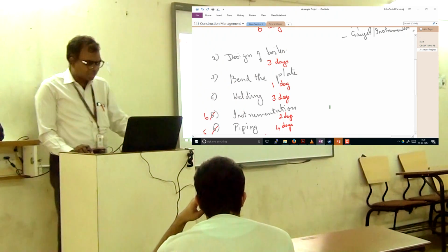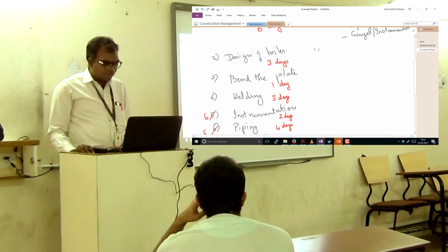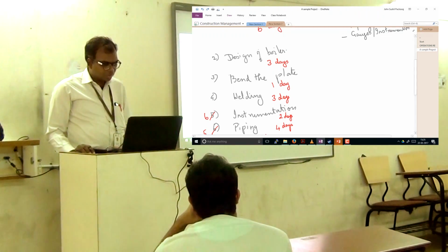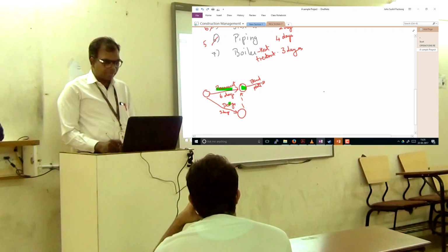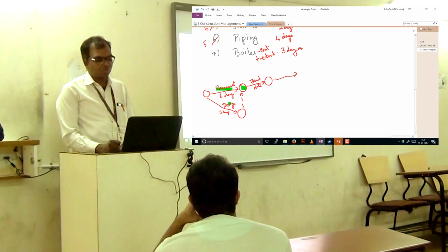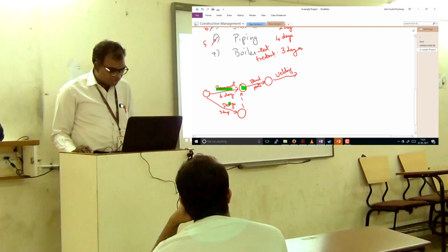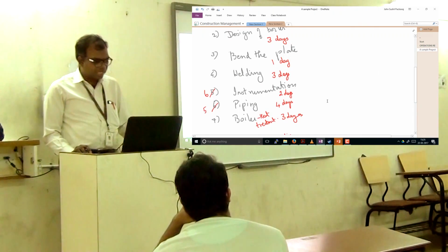So we got the rest of the stuff. I got bend the plate, then I go for the welding. I cannot definitely do the welding before I finish the bending of the plate. So I go for welding, and welding is a 3-day affair.